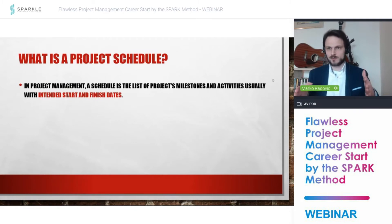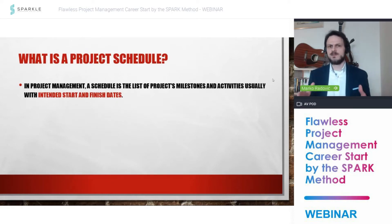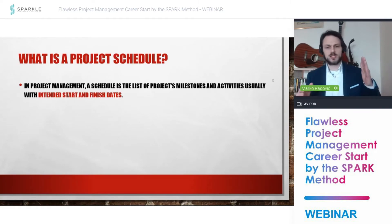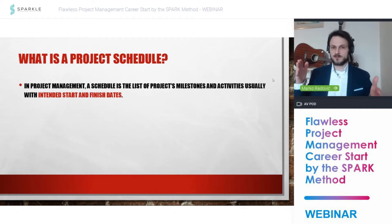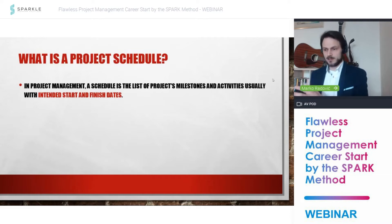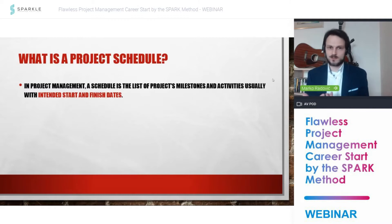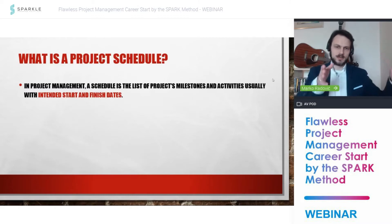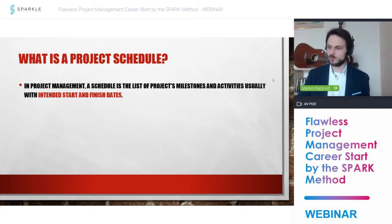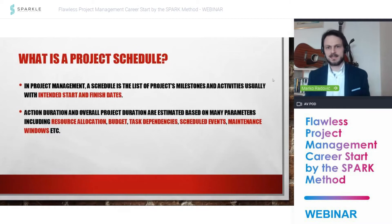We have a list of milestones and activities that have their own start and end dates. Some of these activities are dependent on each other — we have dependencies. You cannot build a roof for a house before you build the foundations. Even if we could theoretically build them independently, we need to wait for the foundations and walls before we can build the roof.